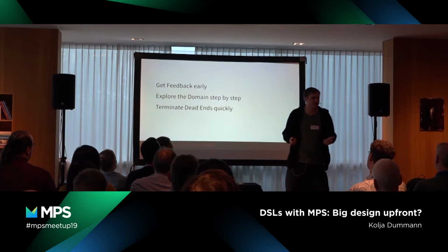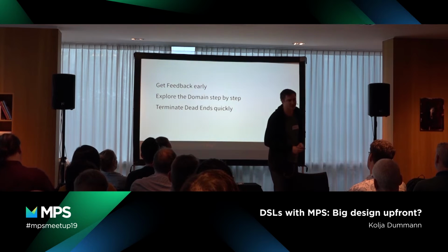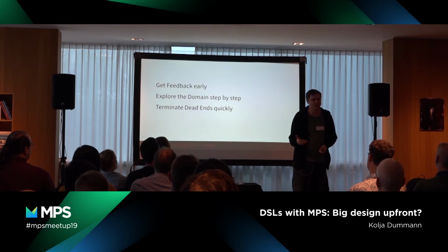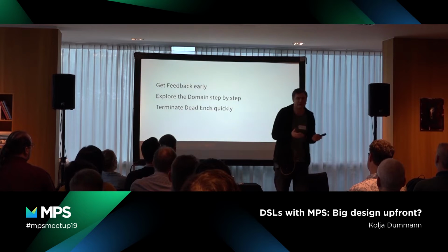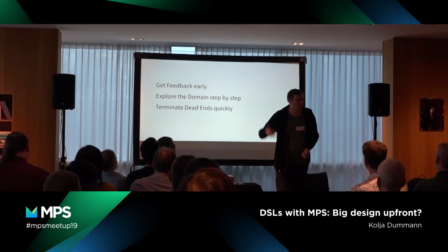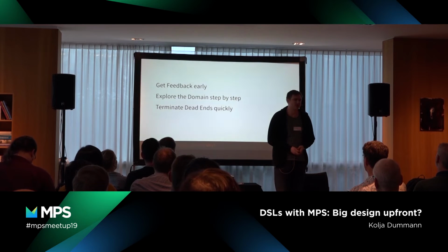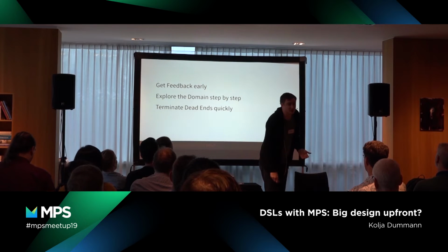But at some point, they noticed that at that point in the development cycle, where they actually specify some parts of the model, it's not necessarily relevant to simulate the complete Ethernet because they might not even know what the final Ethernet of the car looks like. So we got early feedback from other stakeholders in the product that said, this is completely irrelevant for us because there is no network at the moment where we can simulate. So basically efforts could be shifted from integrating a simulation tool to building other features of the language early, without spending too much time on it, because we shipped it to our users and they gave us feedback that this is actually not what they want.